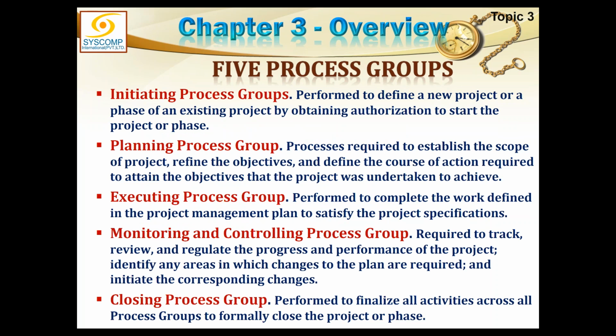So in the initiating process group, what we perform is defining a new project or a phase of an existing project by obtaining authorization to start the project or the phase. So this is the initiation where the project is initiated. In order to initiate the project, the authorization is given to the project manager. Moreover, this also comes into play when we have to start a phase. For every phase, we have to initiate it.